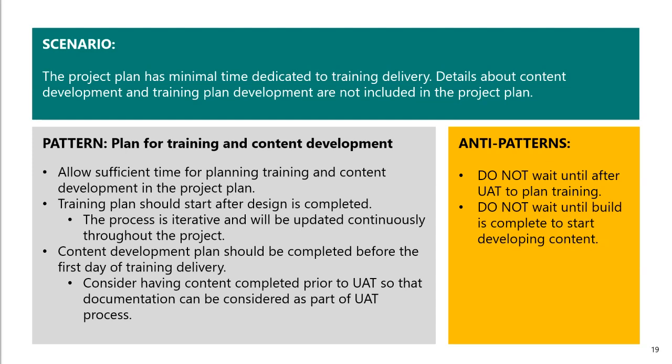The delivery is oftentimes very close to go live. The content development is probably lining up with the end of your build, so it's probably happening simultaneously throughout your testing phase and going right up until the training delivery. You don't want to be developing content the night before your training class. That's not a good situation. Not for the people developing the content, not for the people receiving that content.